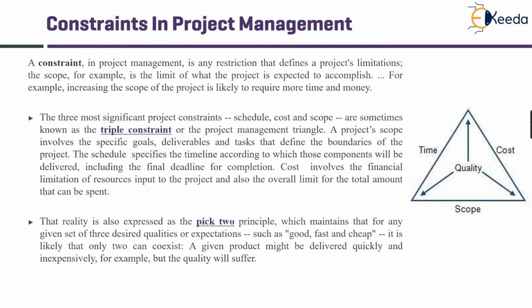If you pick up any side of this triangle and pinch it, that is, if you select the cost side and try to squeeze the cost, there will be an automatic impact, with time and scope getting squeezed. In case the time portion is pushed inside, the cost will tend to increase on the other side.